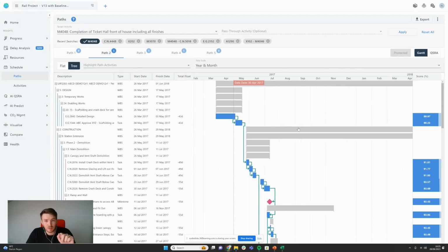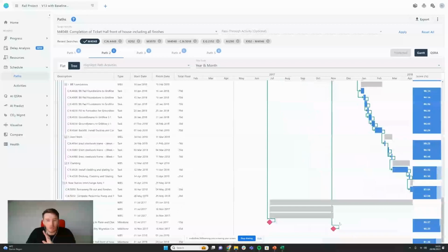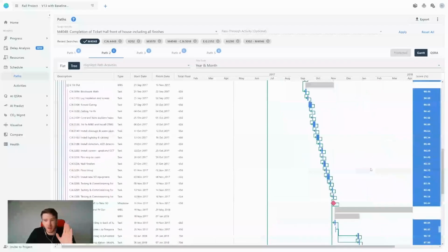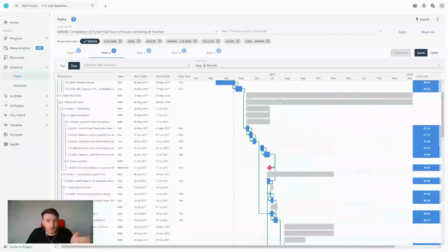And this is much more complex, where we'd need to start at the end and go through how we're going to pull this entire path back here, up this, and maybe it would require some replanning. So we actually break out the interconnections, or it would require that we work double shifts so that we increase the working time in the calendar. So we've got weekends, etc. There are many techniques that we could use, but fundamentally we go one path at a time and look how we can compress those. And that requires a conversation in most parts with the project team.